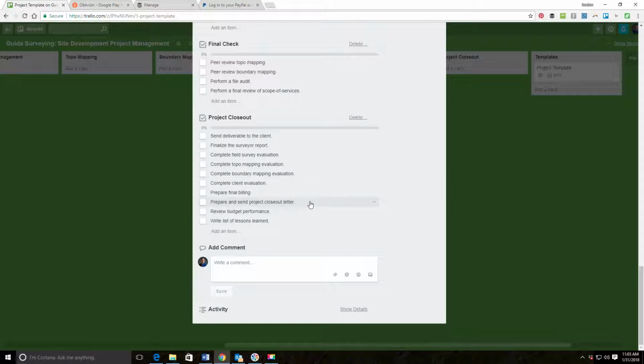Says, good to work with you. We're wrapping up our project. If you think anything else is needed, let us know. We'll review the performance on the budget. What were the budgeted hours versus the actual hours? Where do we have room to improve there?